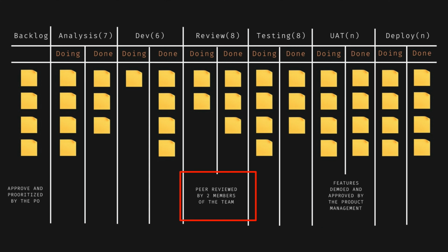Work state policies are nothing but the definition of done for each step in the workflow. Now, this is also very important. Most people do not have the policies that they can check against before declaring that step as done for a particular work item type. For example, if you are in the review step or column on the Kanban board, what does it mean to be done with the review? How will you know if the review is complete? So again, discuss with the team and define some policies around each step. And also, don't forget to confirm the understanding of those policies by the team members.